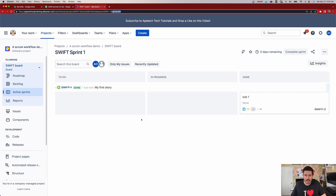You can use this for a couple of things. One, you can go and do a search on your Sprint ID. But probably most importantly, if you want to do a bulk edit — let's say that you forgot to add a bunch of stories to your Sprint — you can now do a bulk edit. Because when you go to do a bulk edit, you actually don't type in the name, and this is for a good reason. It is possible that multiple people had the same genius idea of naming their Sprint 'Sprint 11,' and Jira just won't know which Sprint 11. So when you're doing a bulk edit, you can't simply provide the name — you have to provide the ID so that Jira knows 100%, one for one, which is the unique Sprint that you're intending this story to end up in.